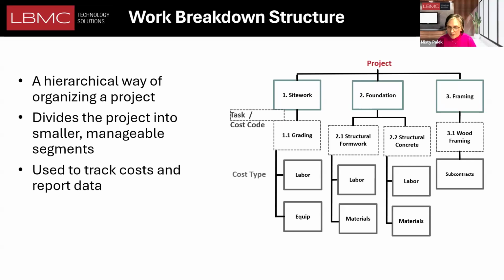They're not mandatory, but that is how we're going to talk through how you get that granularity in job cost reporting today. So project is usually at the top. It's kind of a shell of the other things. And then you have divisions sometimes, which is site work, foundation, framing. Sometimes you have that, sometimes you don't. I tell companies it's okay to be simplistic in the beginning. Most companies who grow get to a certain point where they're going to outgrow that structure.